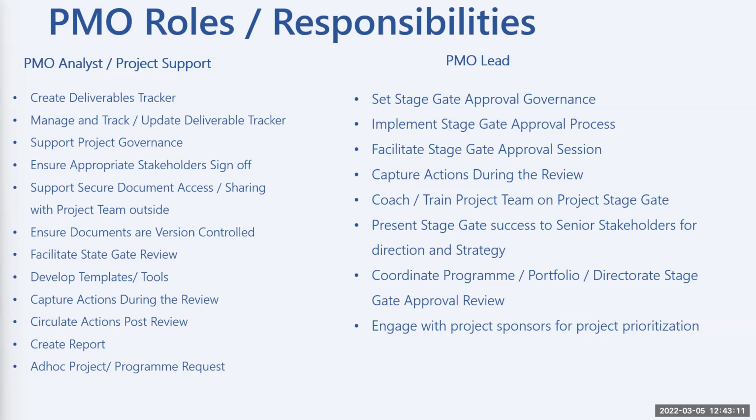In most organizations, it depends on them. Yeah, they have a tracker as well for gate reviews, where the project manager will come to the PMO and say, yeah, my project is tracking on this, and we are due to go to gate 2 in the next 1 month. When is the available time slot for gate review? So you as a PMO need to set up gate review sessions anyway. It could be once every month, depending on how big the program is, or depending on how busy the program is.